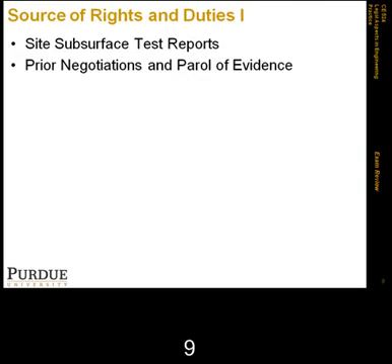We also talked about modifications versus changes. We talked about the fact that a change is something that happens during construction and is generally governed by provisions of the contract. We talked about modifications, on the other hand, which are changes that are agreed upon in the basic obligations of both parties, that are not based on any contract provisions, and basically create a contract of their own.